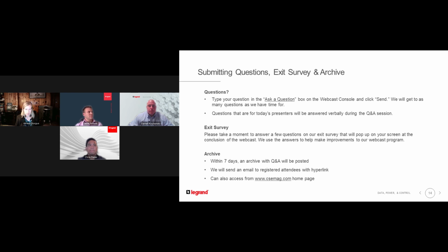Is that a thing? So factory testing on site at a customer and end user site would be no. That's typically going to be pre-functional testing and functional performance testing. Factory testing is typically done at the manufacturer's level. That would be on the manufacturing site, not the end user's site. So typically that's going to be when an engineer will fly into, let's take, for instance, Starline, and they will watch their busway be tested at Starline's facility, much like a UPS.